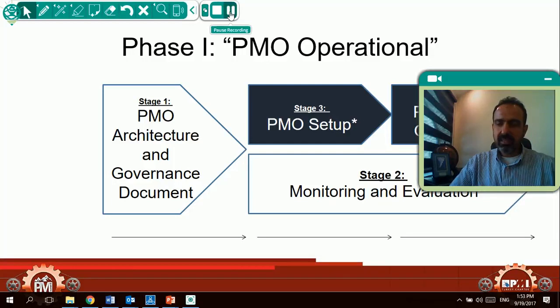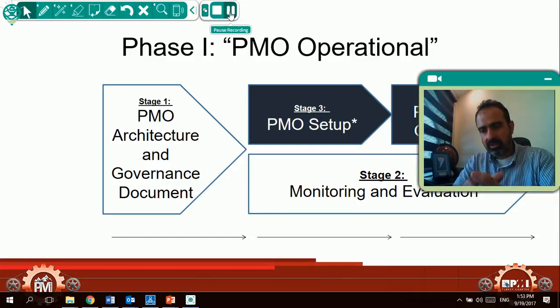One of the things that I have seen done very successfully is to start the PMO with ensuring that a charter is done before any resources are committed to any project in the organization. So the organization put together a process for the charter specifically, not a general project management process, saying from now on, if a project needs to be done, there has to be a proposal. Once it's approved, then we need to write a charter. And the charter has to be signed by 1, 2, 3, 4. If the charter is not signed, no resources are allowed to put time on a project.